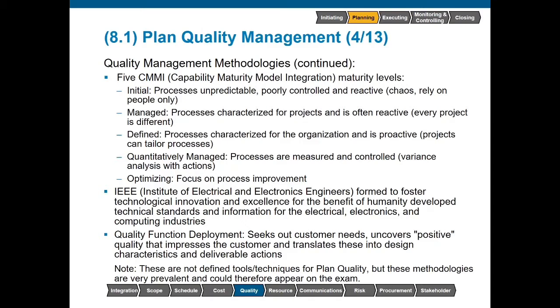By the time we get to a defined process, this is where the organization has some type of policy, procedure, process defined for this type of work. Now, the project can still go ahead and tailor or tweak in minor ways, but that process is still going to be recognizable. Within the PMBOK, we tend to call this an organizational process asset. This is something that we can take from that corporate knowledge base and use within our project.